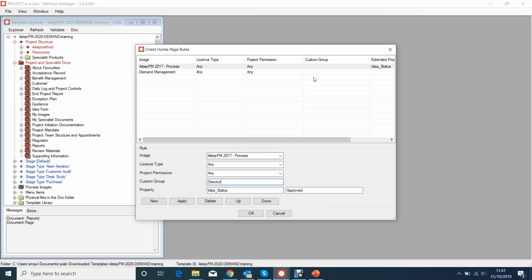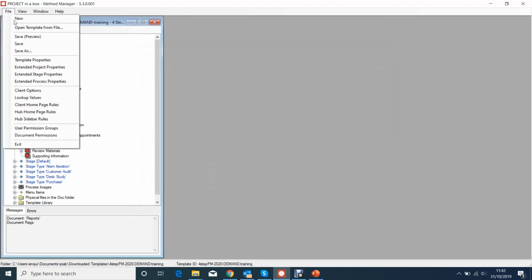Permissions, of course, is a lockout of functionality. So if they've only got a read level, they won't be able to see, for example, the entire project's plan. They will only be able to see tasks assigned to them. So there is a lockout of some of those aspects in functionality. But navigation is quite a significant driver of what people actually use. So that sort of stuff is very important, setting those permissions groups.